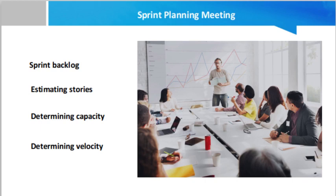Next is determining the capacity. Your team's capacity is a measurement of how many story points or backlog items they can complete during a sprint under normal circumstances. To find your team's capacity, multiply the number of team members by the number of hours they can productively work in a day, subtracting time spent in team meetings or devoted to other tasks or projects.